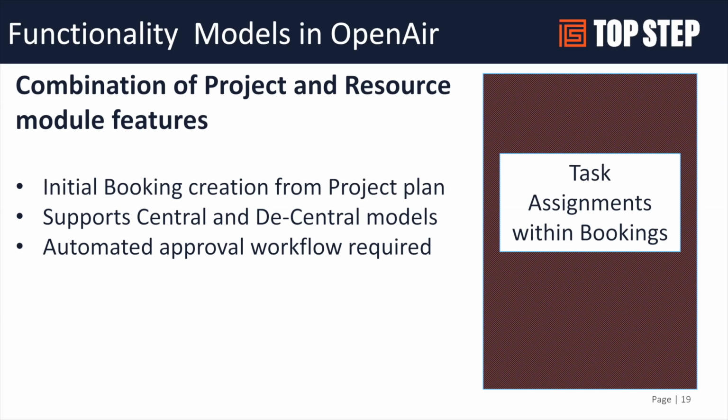Also, I mentioned it earlier, but I want to mention it again. The Project Center in the recent release allows you to pull in the worksheet from the resource module into the Project Center. That's a really powerful way, and it's how I pretty much book my resources. I go into the Project Center, into the projects, and add my generics week over week, or put in my bookings, and then I manage those as projects change dates and update those with named resources as projects go live.